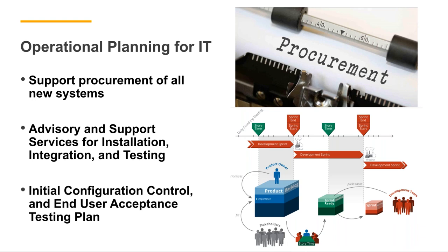There's existing systems that you may have from your parent organization or outside laboratories that you may need to integrate with. So all of those services in terms of how do we get all of our equipment into the facility, and then once all the equipment's into the facility, how do we install the software and applications on the hardware, and then make sure that it's all integrated and working, and then testing. All of that's a critical aspect of operational planning, believe it or not. And this all happens during the construction and commissioning process as part of it.